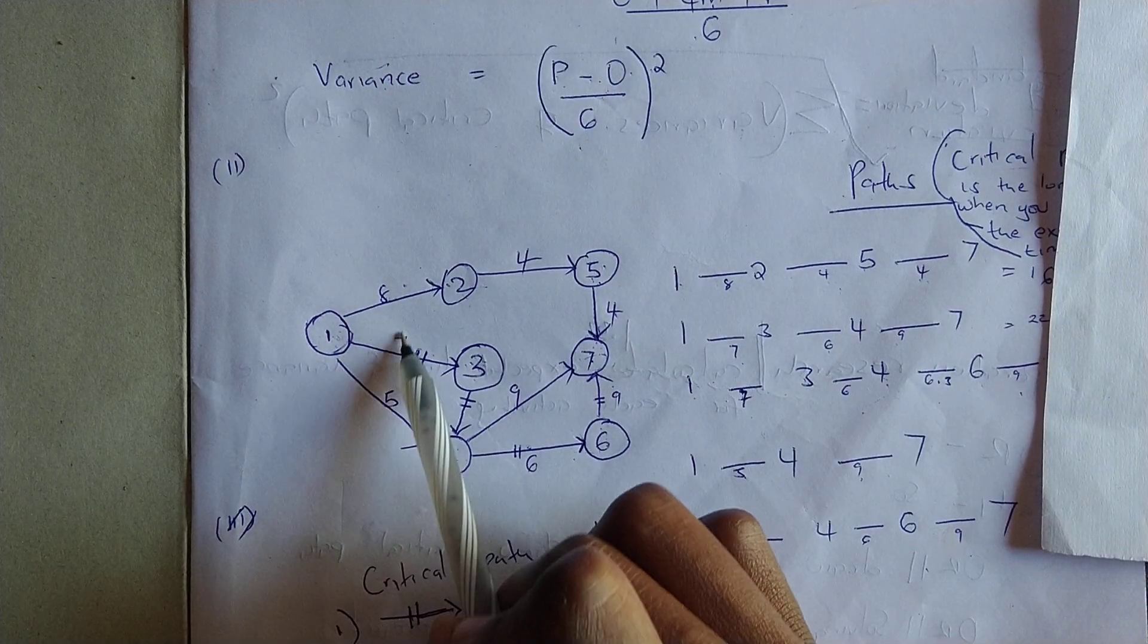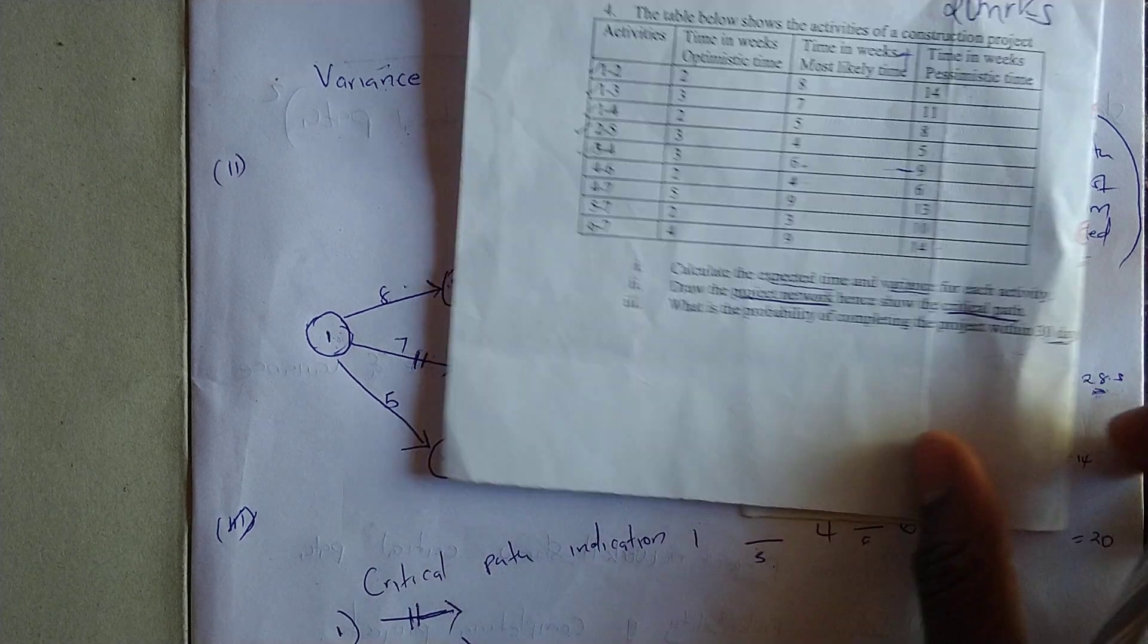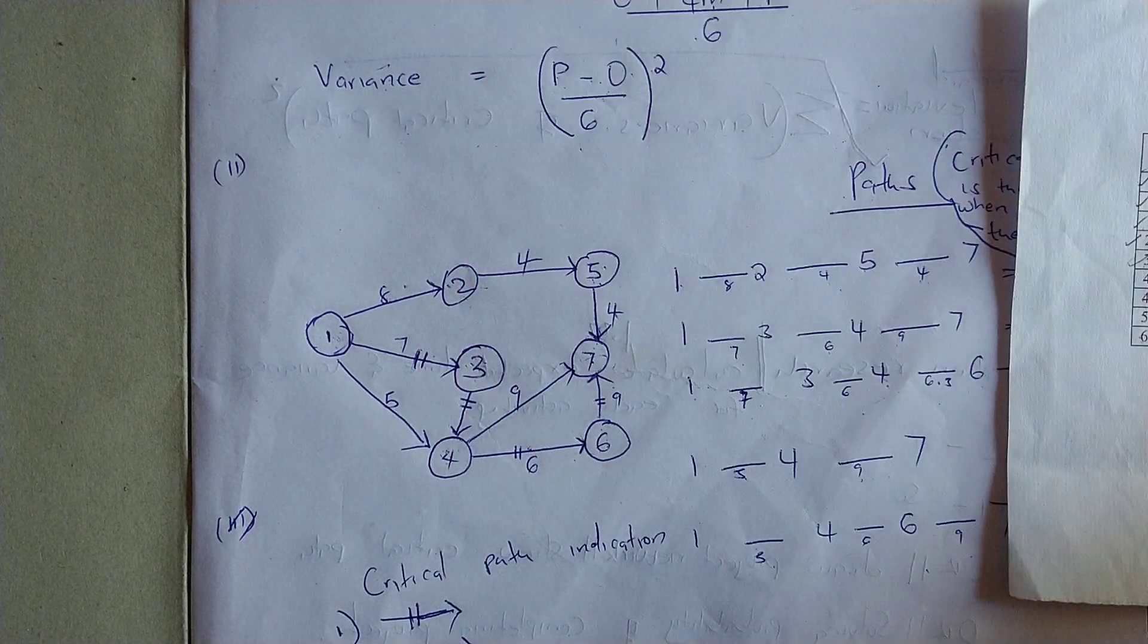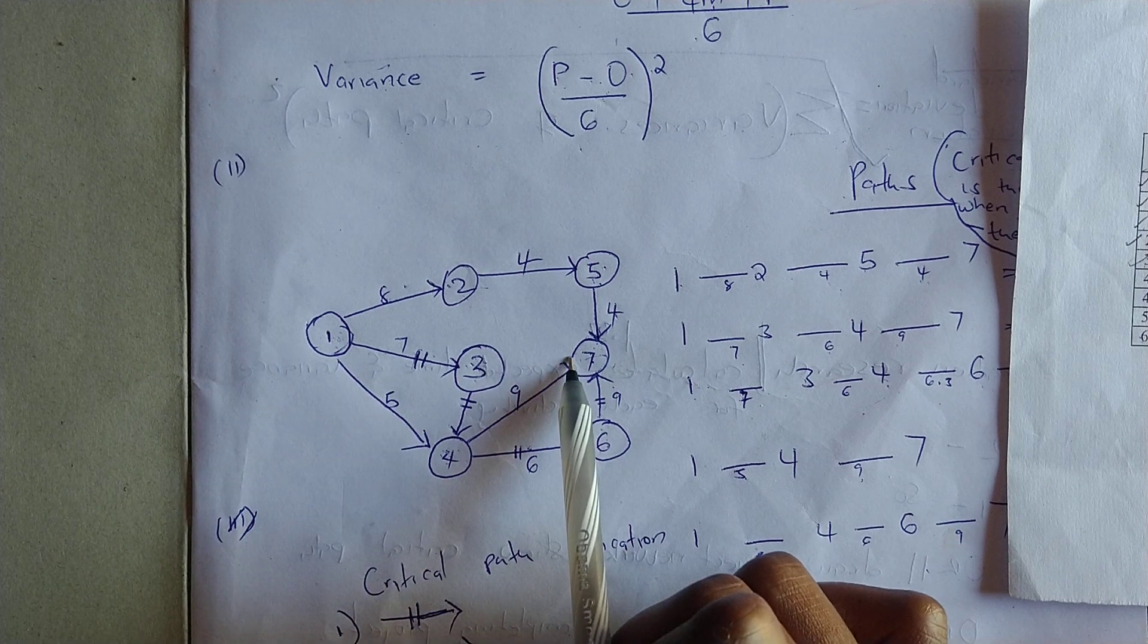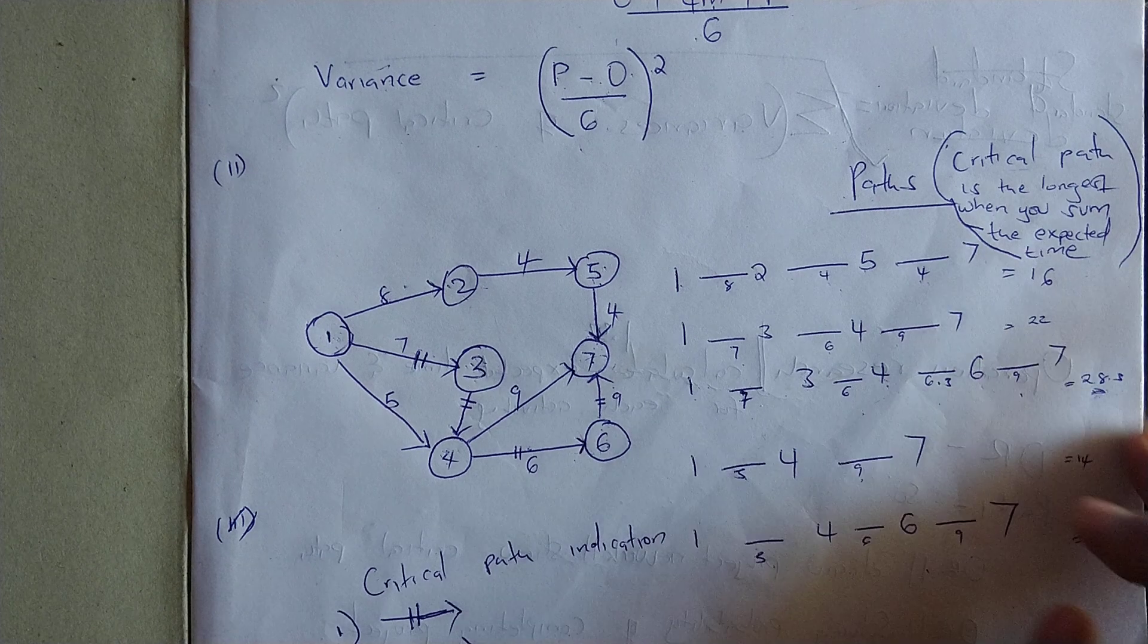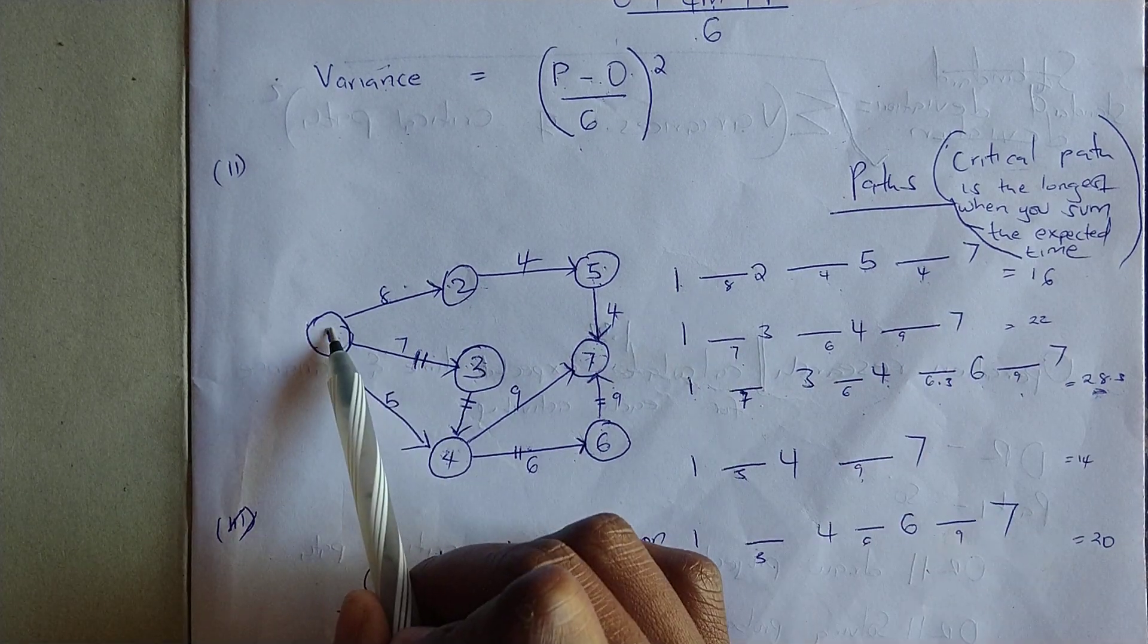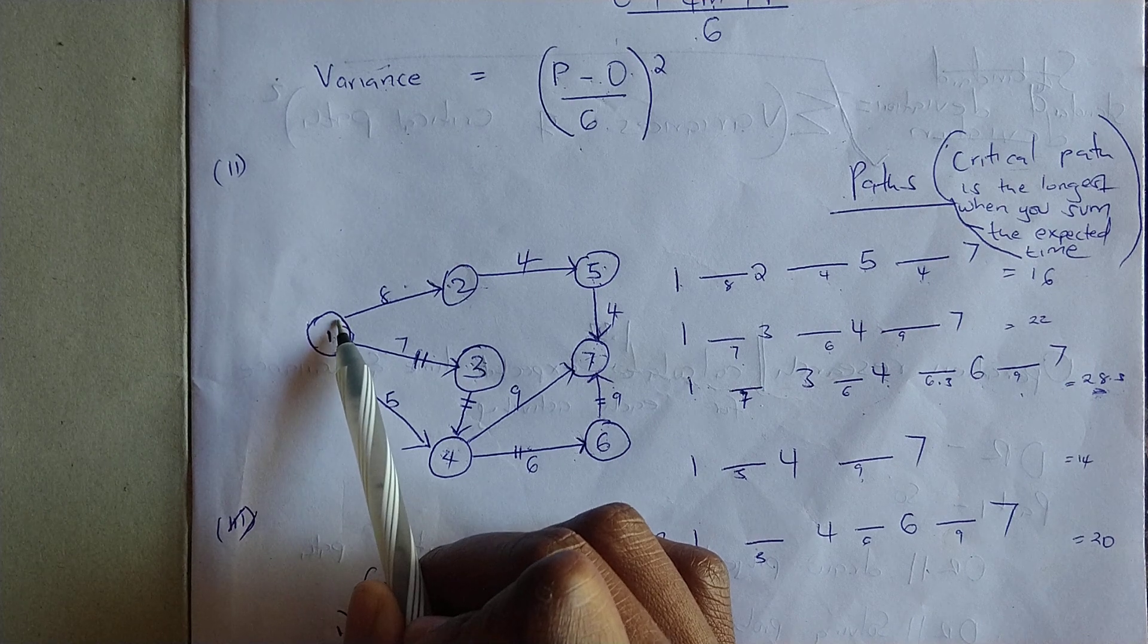To find the critical path, we're going to list all the paths from one to seven and then sum them each up to find the longest. For example, in this activity we have the flow of activities that will start from one to seven.